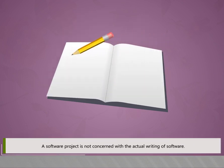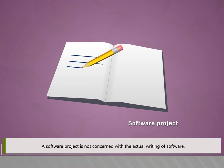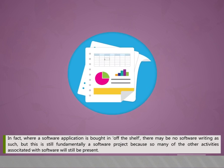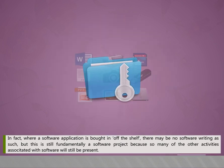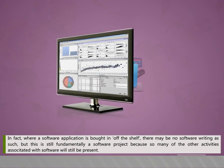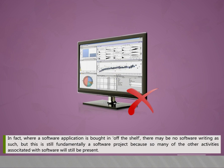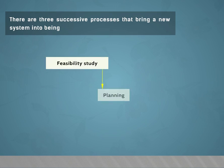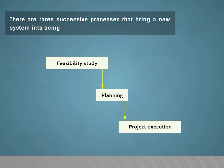A software project is not concerned with the actual writing of software. In fact, where a software application is bought off the shelf there may be no software writing as such, but this is still fundamentally a software project because so many associated activities will still be present. There are three successive processes that bring a new system into being: feasibility study, planning, and project execution.